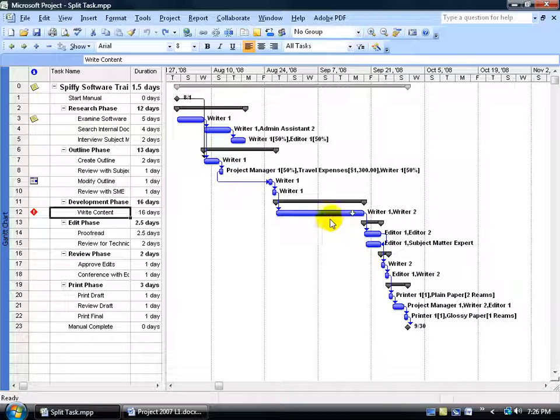So what if I go ahead and divide this into 2 tasks? Writer 1, of course, works on the first 5 lessons, and then Writer 2, the second task, works on his. Now think about this for a second. Does Writer 1 need to finish or complete his first 5 lessons before Writer 2 can start his last 5, or lessons 6 through 10? Well, maybe. I mean, if there's something that's connecting them all, but if not, then I can go ahead and have them both start their task at the same time.